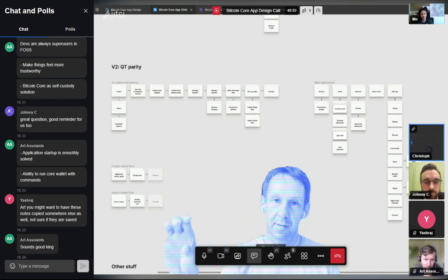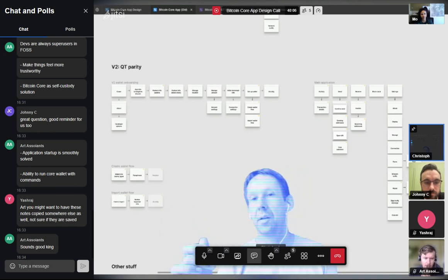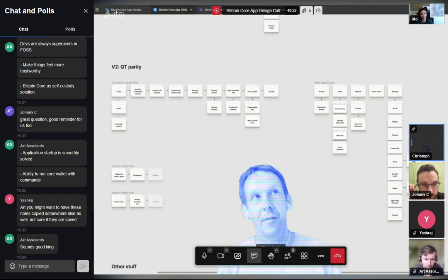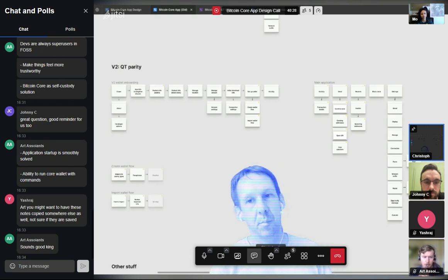So we all decide this is milestone 1, and ideally we could also spec out a little bit about what our time estimate is, and that should involve time for personal travels and sickness and other type of stuff, and be realistic. And it can be rough, right? So I would like to ideally spec out that QT replacement milestone, because I think we can get to a good point there because it's a very specific goal. And maybe the other 1.1 polish, I think we can also very specifically decide. And then maybe 1.2 or 1.3, whatever we're going to have there.